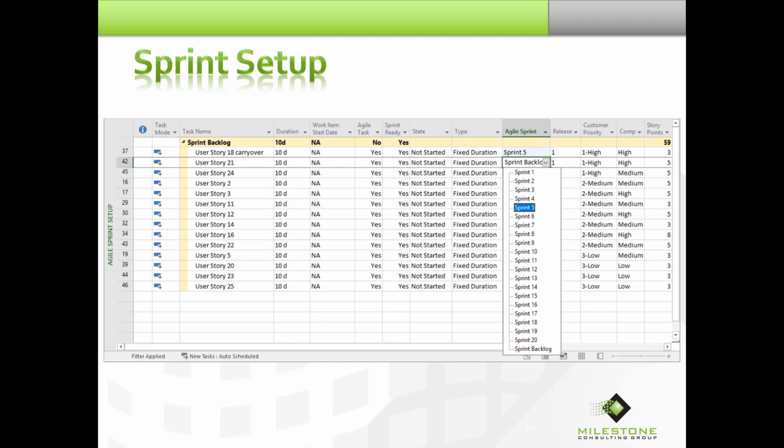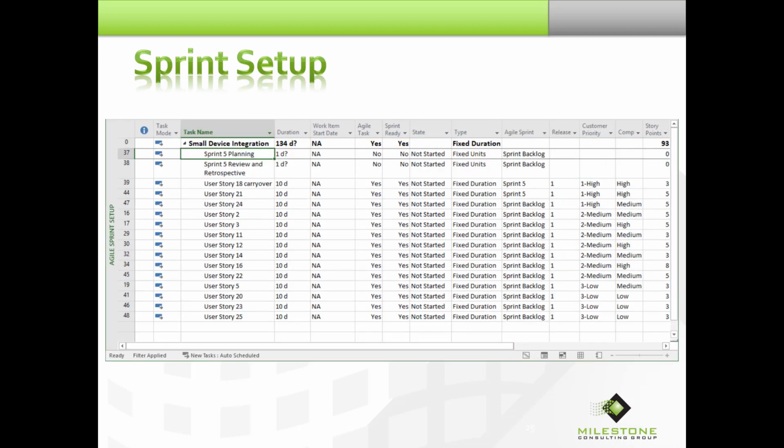Then I have to ungroup the view. And this is because Microsoft Project will not allow me to insert activities in a grouped view. If I were simply to add them at the very bottom, then Microsoft Project would add them at the bottom of that task list on the Gantt chart. We saw that and we put them underneath those additional sprint tasks. Personally, I like them underneath the development section. So I ungroup the view and then I can do an insert.